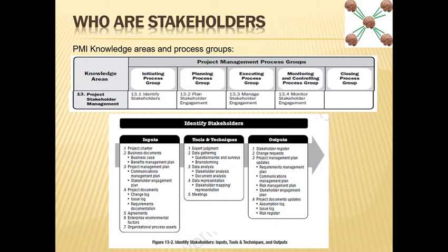Also, you will have project documents like the change log, the issue log, the requirement documentation. Then you can look at the agreements, if there are some agreements as part of the project. For example, if the project needs some right of way, there are some right of way agreements, or you need to involve some third parties, there are some agreements done with other vendors. So those vendors also become your stakeholders.